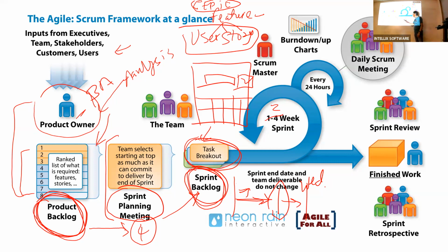Right, so it happens over 1 or 2 days. But you have to finish the testing. The whole point of the sprint is to deliver working software. That's why, as a team, you decided on only 4 stories. You have to deliver that on Friday in production. So if you finish on Wednesday, you have to deliver it on Friday, right? Your job is done on Wednesday. Then who comes next? The user. They have to test it. Yeah, user acceptance.